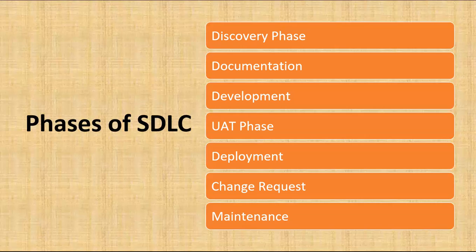In the 5 runs, we need to monitor the results, track the results, and share them with the business team, and the business team needs to give the approval. Then only will we go for the deployment. At the final stage, we are deploying our robots to the orchestrator setups. This is called the deployment stage. Who is responsible? The BA, developer, technical architect, technical manager, and technical lead are responsible. That is done.